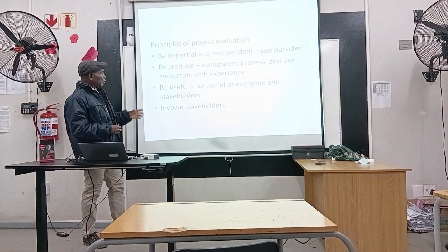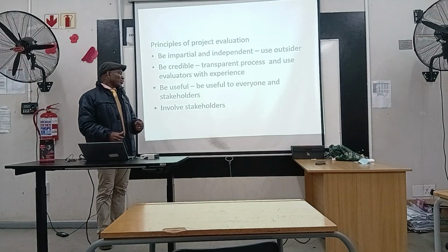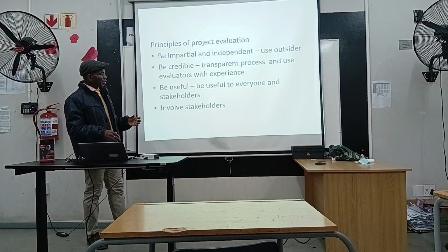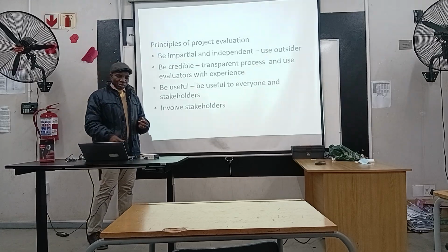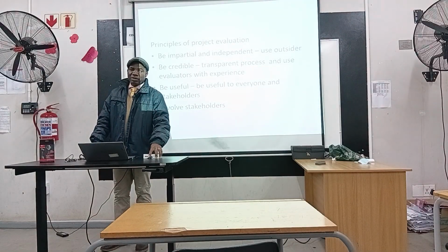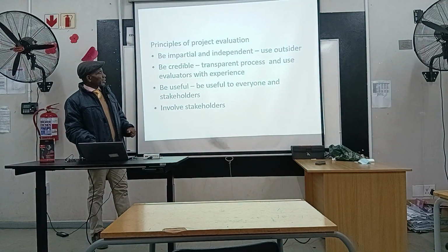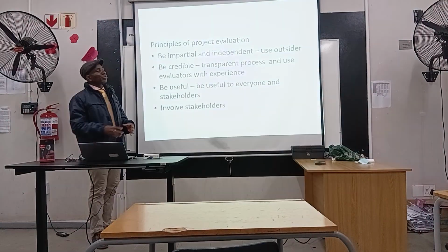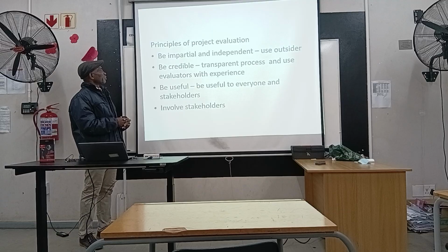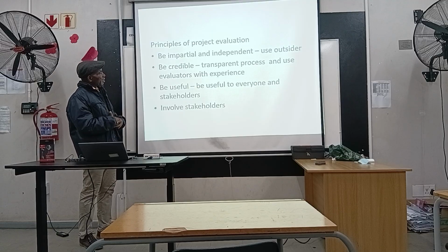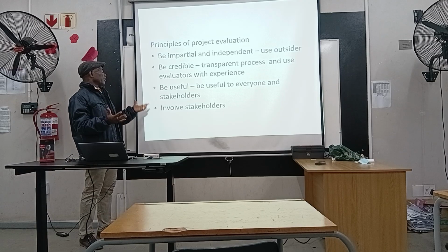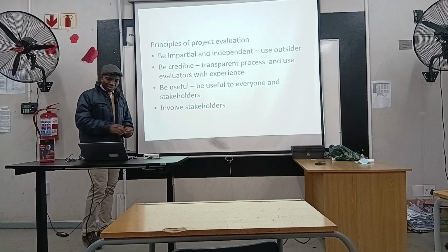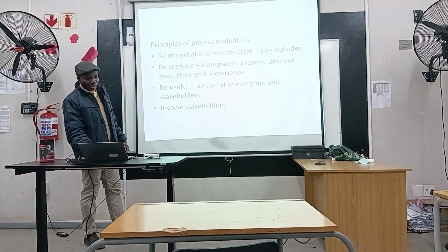Then the outcome of the evaluation should be useful to everyone, as well as all the stakeholders, right? One must always involve all the stakeholders in the project. So for an evaluation outcome to be considered credible, it should be done within the precinct of the following principles: be impartial and independent, be credible, be useful, as well as involve all the stakeholders.